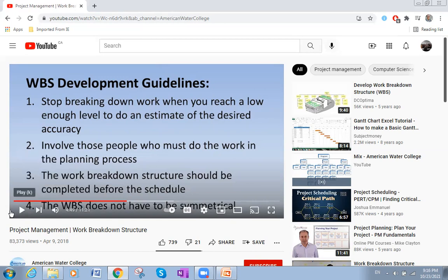As an example, the cleaning and dusting example: when it goes down to the final subdivision of the task, it doesn't mean that all the stages must be the same. Vacuuming is different from cleaning the curtains, and cleaning the curtains is different from cleaning the carpets. Each task can be divided into subtasks. As an example, cleaning the carpets: how many levels or subdivisions should it take? Only one level, cleaning with vacuuming, that's it. But for vacuuming, to find the vacuum, you have to plug it in, you have to take it and put its components together, and then after that start vacuuming. Those are 3 steps.